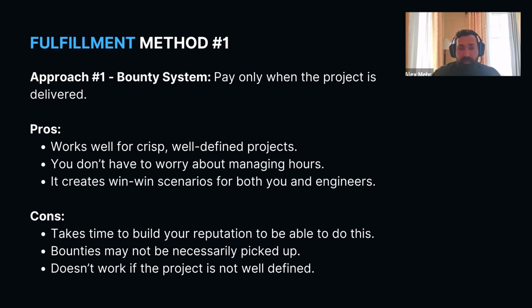Now, the other con of this is that it doesn't work if the project is not well defined, which is why I said do it in 2 steps. The MVP is essentially the blueprint for the final product. Okay. So that's why I think it's important for you guys to be able to do some no code work to get the MVP out. So the engineer looks at it like, oh, so I've got to just add this and that and codify this project into a website or a mobile app or what have you. Does that make sense, guys? So it doesn't work if it's not a very well defined project.